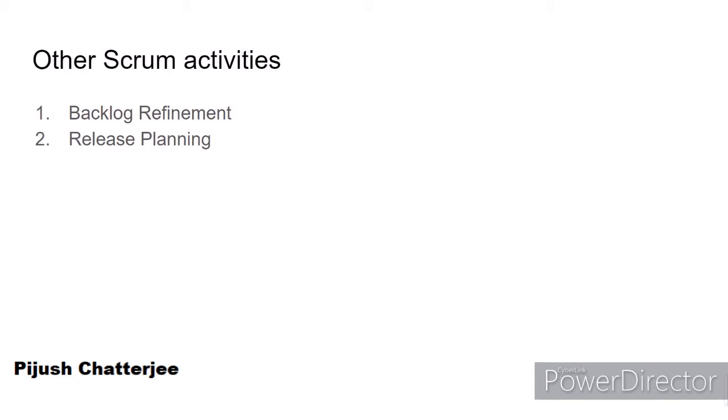There is also release planning that is sometimes done separately from the sprint planning. Release planning means that after several sprints are done, if you want to release your product increment to production, you can have a release planning, but remember, this is not a Scrum defined time boxed event. So release planning is a completely different thing from sprint planning, which is a time boxed event, and every sprint should follow that ceremony.